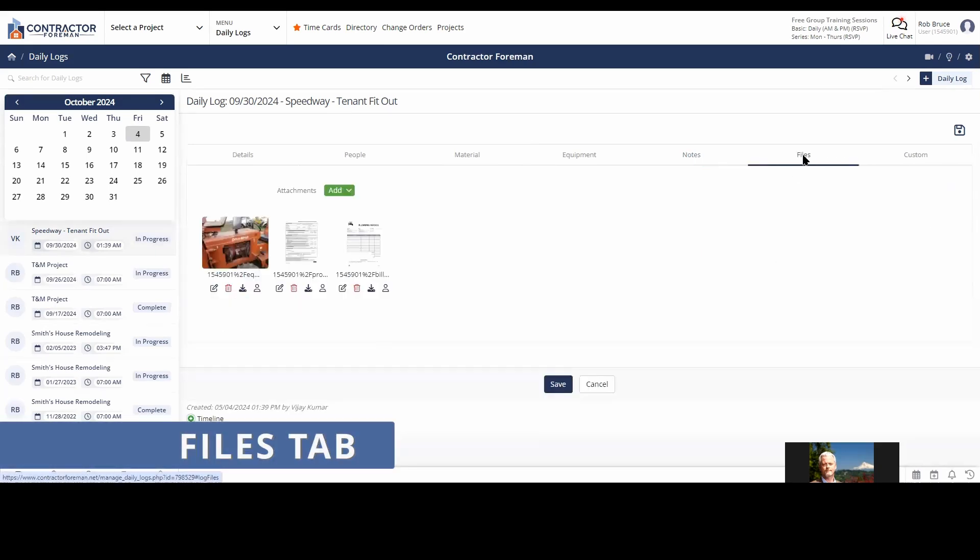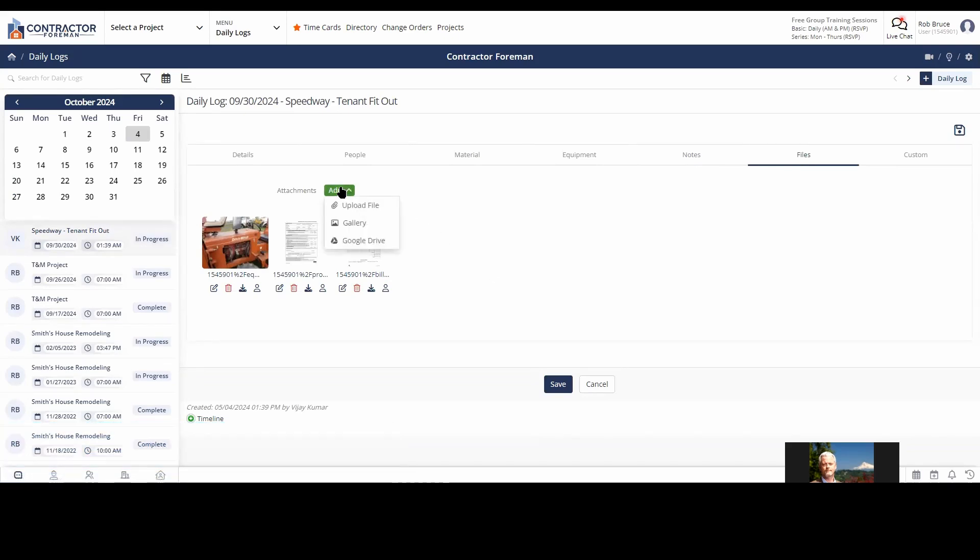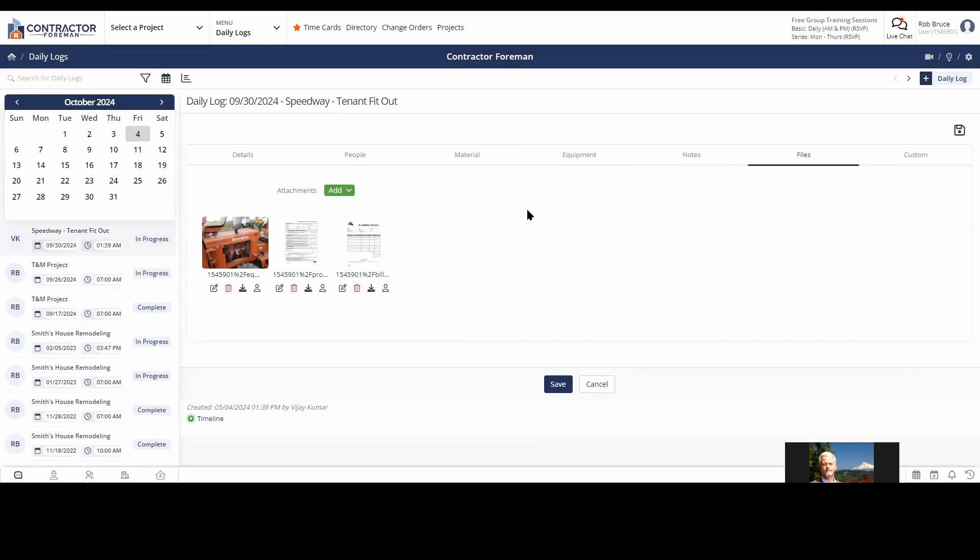The files, here's where you're going to load up those progress photos. So on the phone apps, you're just going to hit add and click your camera button and it'll load up your progress photos. I always say take photos at the very start of the day, take photos around lunch, take photos right before you leave the job. That should be the last thing you do at the end of the day. As you're leaving the job, just walk around and take some pictures of how you left the job that day.